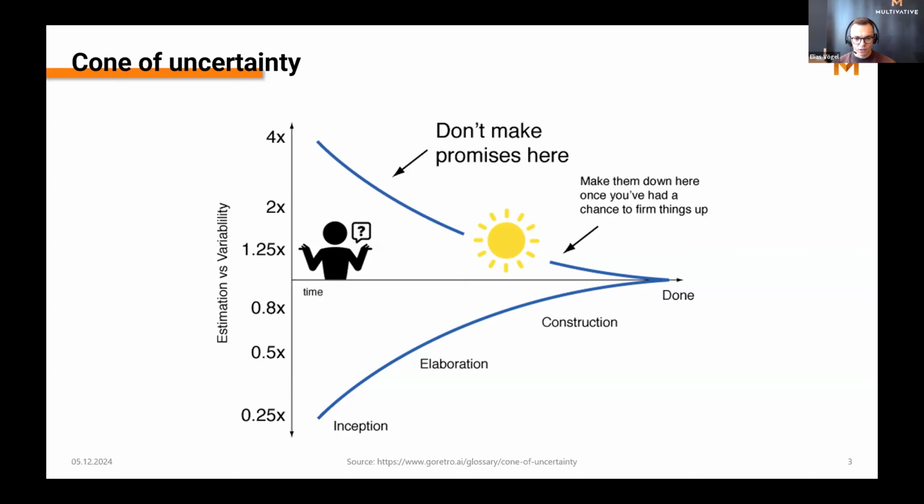The goal that we have is always to get an estimation about the duration and the cost of the project that is as realistic as possible. But unfortunately, we as humans are incredibly bad at estimating durations of work tasks. There is the famous cone of uncertainty, which is on the slide. And it basically says that if a project takes 1 year in reality, our early estimations at the beginning of the project can vary between 3 months and 4 years, according to statistics.